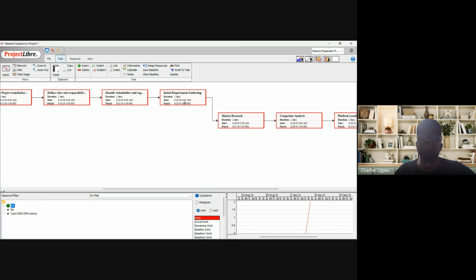There might be different people doing this job. This person is already waiting for you to finish so that you can use some of your report to do his own job. So if you miss these 2 days, he's already delayed, pushing his own work, disorganizing everything here. Maybe he has agreed that after these 2 days, he can go on holiday or do other things. So if you miss these 2 days, you're already disrupting this sequence of activities. And that's why we call it critical path areas.